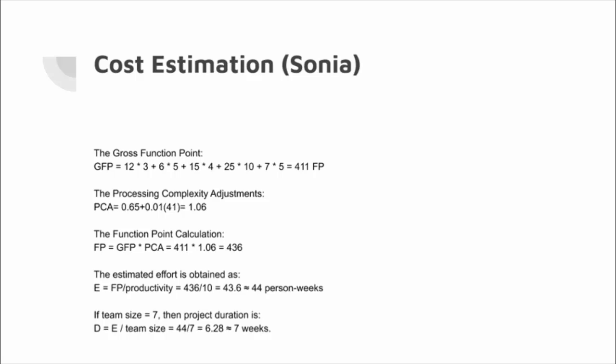And the estimated effort is obtained as 44 person-weeks. And in our team size, since we have 7 of us, that came up to 7 weeks. This is because we are students and we are working only a few hours per week. So this is the reason why we came up with these numbers.